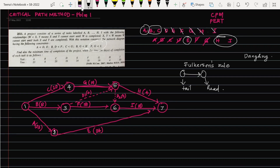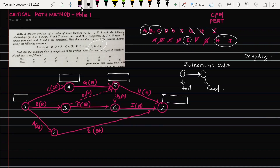We can see that Fulkerson's rule is followed throughout the network diagram. Now, before proceeding to the next stage, let us mark the earliest times and latest times in boxes above each node. Each box is divided into two cells — the first cell for earliest time and the second for latest time. We shall compute earliest times first, then come back and fill in the latest times.